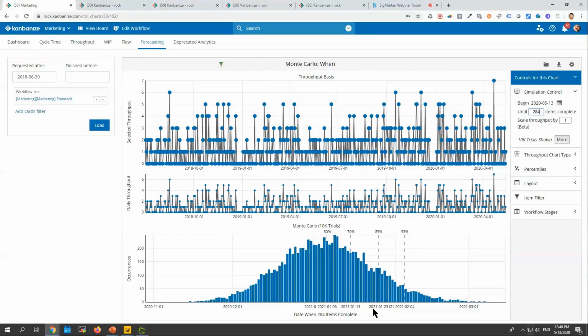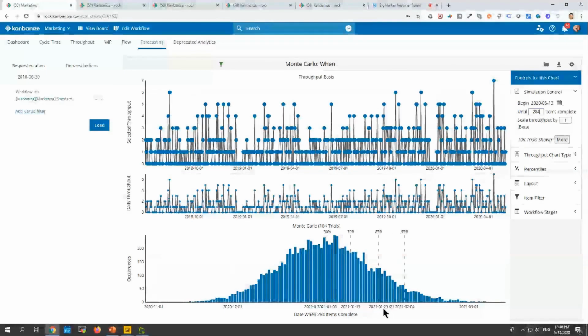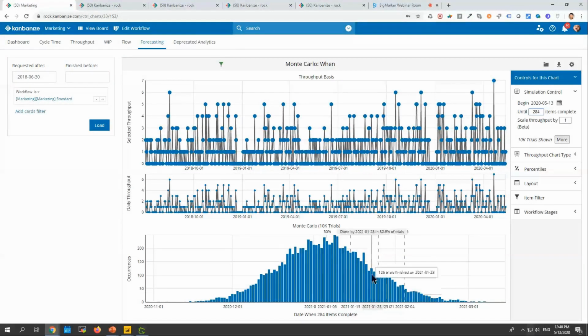I didn't stress that enough, but it's absolutely critical that we always assign a probability to our estimations or our deadlines. If you communicate the 25th of January 2021 without this probability here, then you've just committed to a fixed date delivery, and in knowledge work, that's rarely realistic.